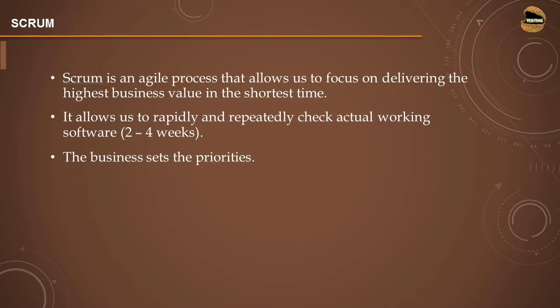Unlike traditional approaches, Scrum helps you to create business value and deliver work products in the shortest interval of time, where the shortest interval could be two to four weeks — a fortnight or at least a month. It allows us to rapidly and repeatedly check actual working software in this interval. Every sprint or iteration, you actually deliver a product, and the business sets the priorities of activities to be covered.